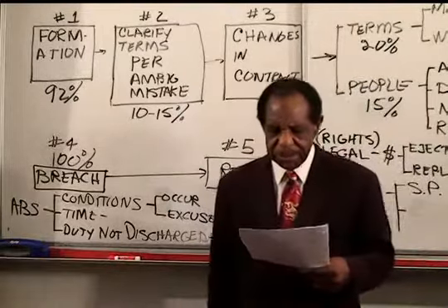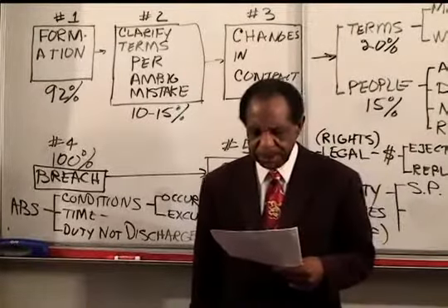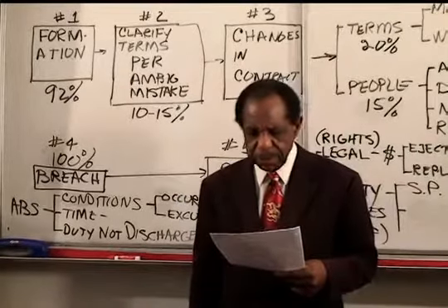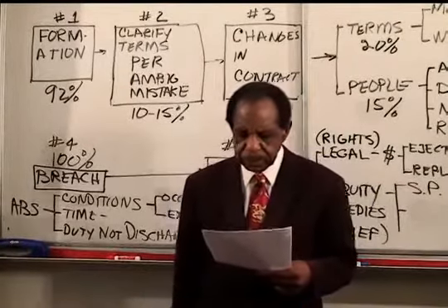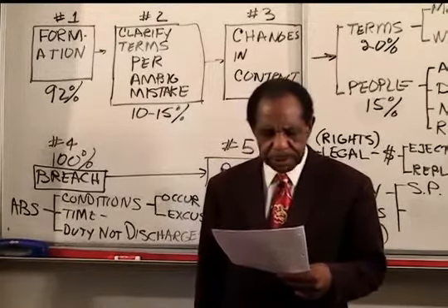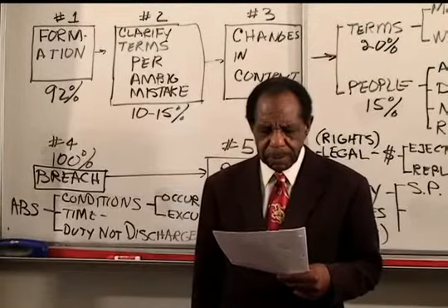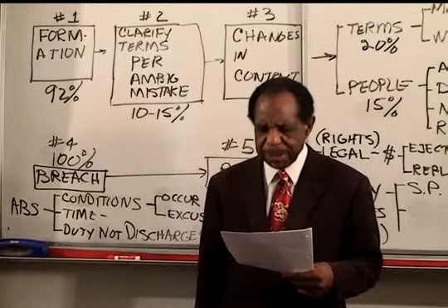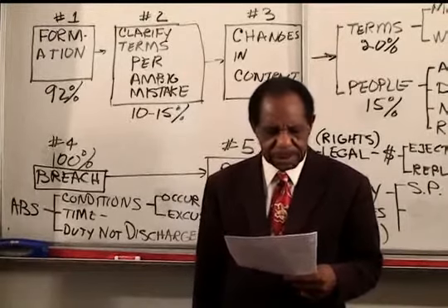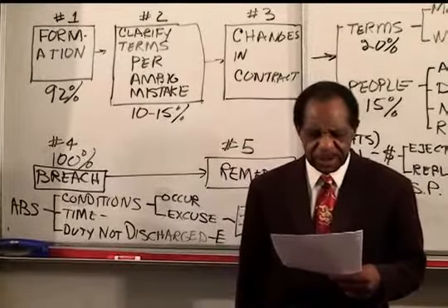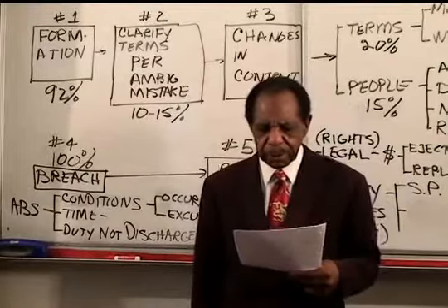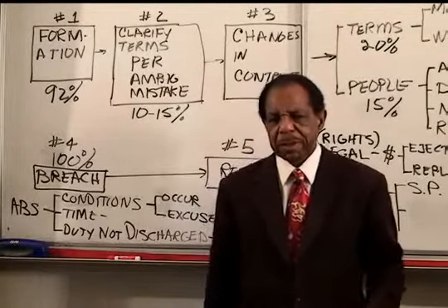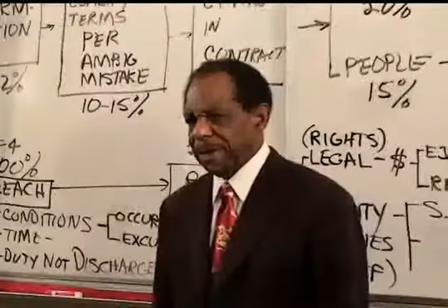Continuing with the same problem, starting after 85 cents per pound, it says next, on February the 1st, same year, Jones, in good faith, notified Motors he could not afford to sell the bolts at the agreed price. He said he would charge 90 cents per pound, and Motors orally agreed to the increase in price to begin with the first installment. Now obviously these people are trying to modify the contract.